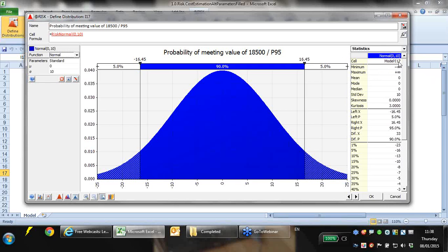Infinity, by its nature, you're never going to get to, but you can have an incredibly long tail on a cost distribution. But what you're never going to get on a cost distribution is a negative like this. When you need to build things or buy things, you're never going to have negative costs. So for me, it's a distribution where part of it just isn't relevant.